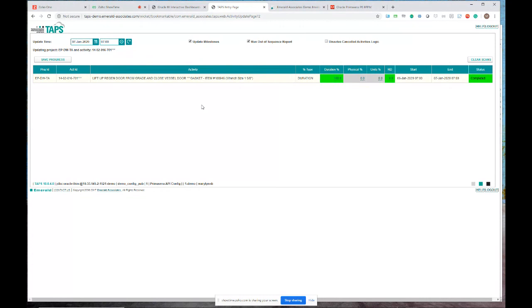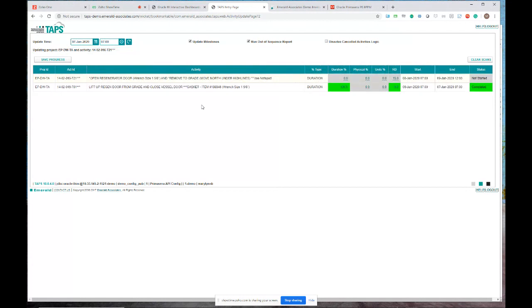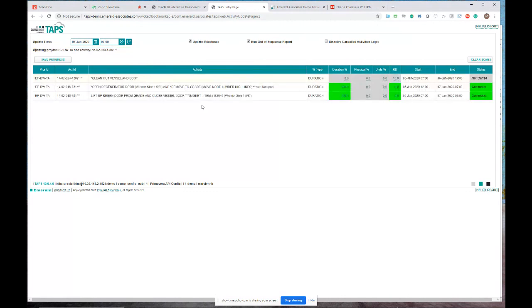Now, I've got another activity. This one's also completed. Now, I have a third activity we'll put through with this update. This particular activity has been canceled. Now, as Sue was saying in the intro, you'll notice that canceling an activity, I scanned it, I scanned canceled, that's all I needed to do. So from here, all I need to do is save progress.